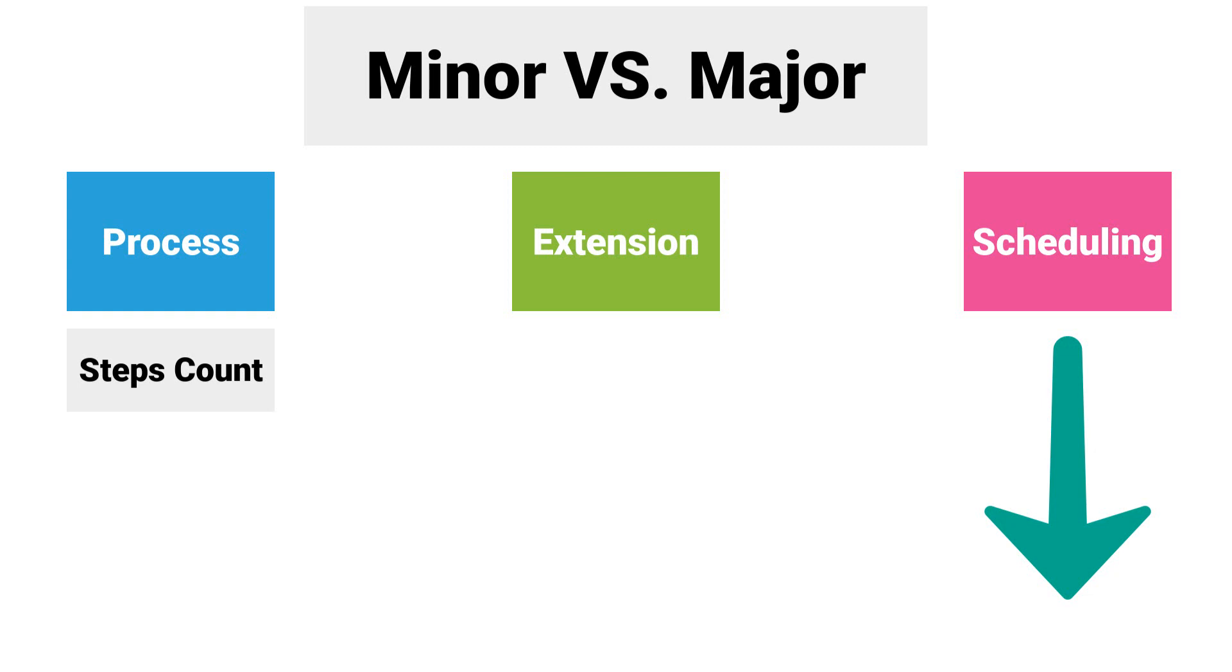It should also be checked whether the logic should be changed. Now, based on the number of steps in the logic, you can decide whether it is a minor or a major change.